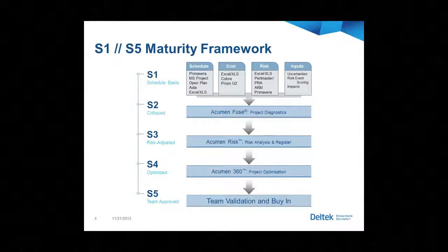And so really where we come into play is this S2 and beyond stages, if you will. In the S2 stage, you're bringing in that schedule and those different inputs and data and information, and we're going through some project diagnostics. I'll get into each one of these in a little more detail in a little bit, but basically you're critiquing your schedule, you're understanding those strengths and weaknesses, and you're going back through and making those corrections. You're fixing the schedule, you're improving it, and you'll see a lot of talking about schedule score. So you're aiming for the best schedule score that you can have.